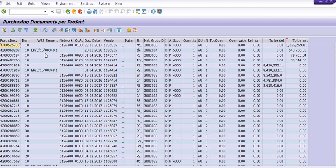Invoice verification is pending - Miro is pending. We are unable to close such projects. Either we have to reverse the goods receipt or we have to short close this purchase order, then we can close the WBS. This is the way you can check.